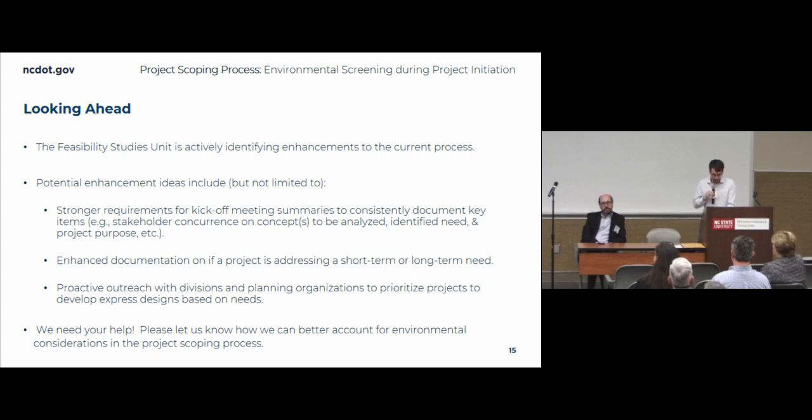And then also, it's not just enough to invite stakeholders to a meeting, especially when it comes to MPOs and RPOs. If we're inviting them to these meetings, we want to partner with them. Some of the feedback I've heard from MPOs and RPOs is that they feel caught off guard sometimes when we invite them to this random project kickoff meeting, and they're like, well, how the heck did this project come about? So part of it is partnering with them in terms of having a work plan or a program of truly identifying the projects that are providing value based on what they've submitted.